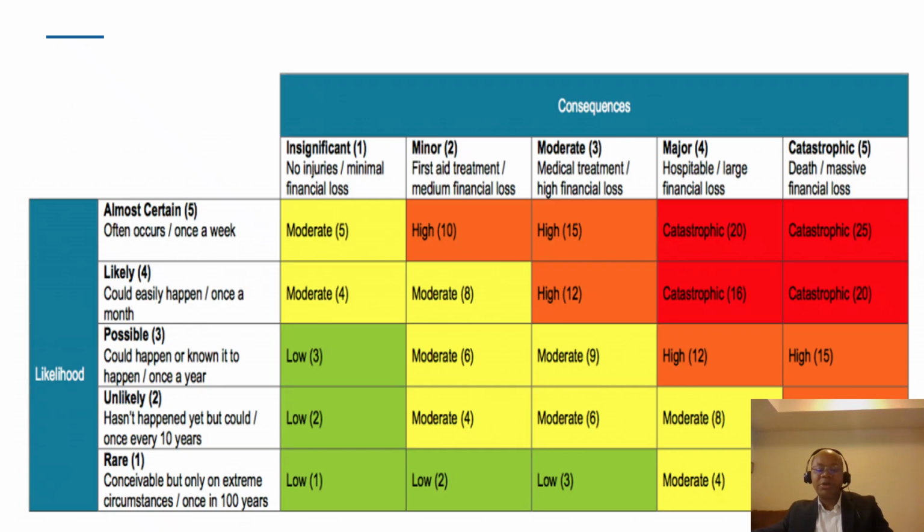So when we do risk analysis and evaluation, because of the fact that it's almost impossible to have all of the resources required to manage all the risk at the same time, this chart gives us the ability to now prioritize. We first and foremost focus our attention on the catastrophic events and put in place controls that will ensure that if they happen, the impact is minimized.